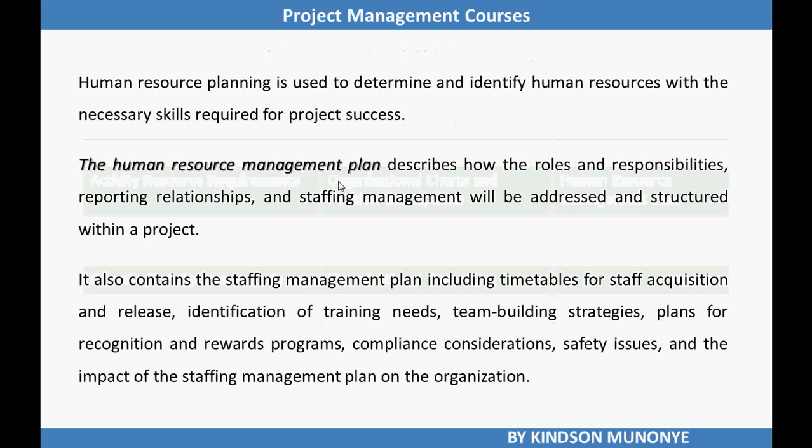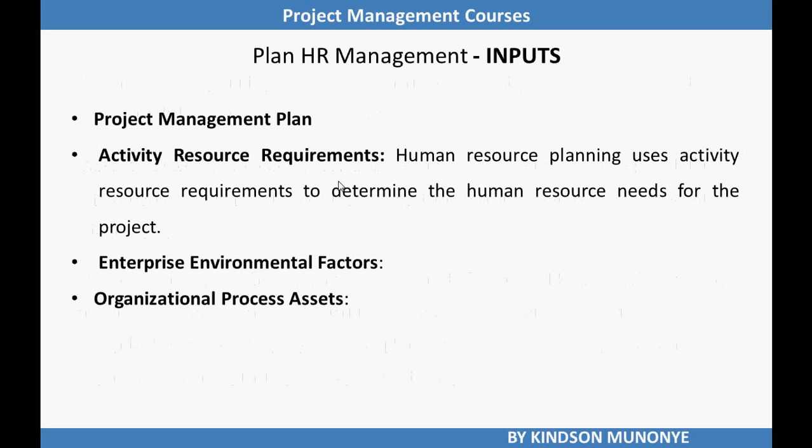The human resource management plan contains the staffing management plan, including timetable for staff acquisition and release, identification of training needs, team building strategies, plans for recognition and reward programs, compliance considerations, safety issues, and the impact of staffing management plan to the organization.